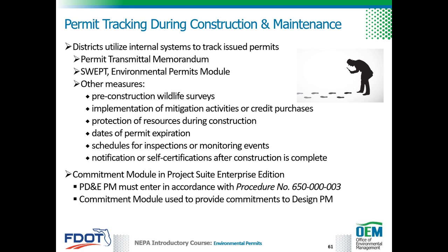The PD&E project manager must enter all commitments into the commitment module in accordance with FDOT's project commitment tracking procedure. The commitment module will then be used to transfer these commitments to the design project manager for future tracking.